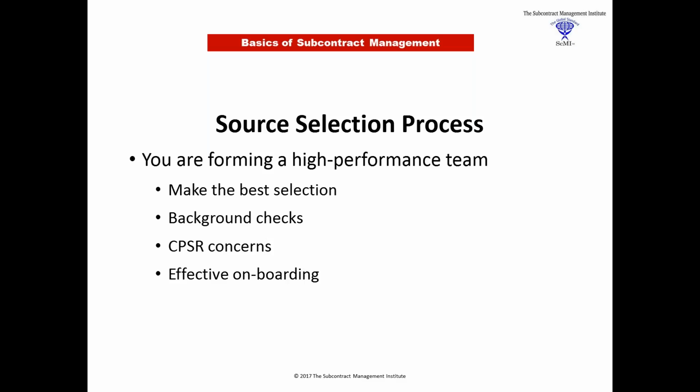The next thing you have to think about is your CPSR, your Contractors Purchasing System Review. If you're a prime contractor and you are going to be audited in how you deal with your subs, you need to make sure that you have full and open competition and all the things the prime contracts people were saying. Because if not, your system will not be approved. If your system is not approved, you have to play Mother May I. You have to go to the government for every significant contract and say, may I award this contract?